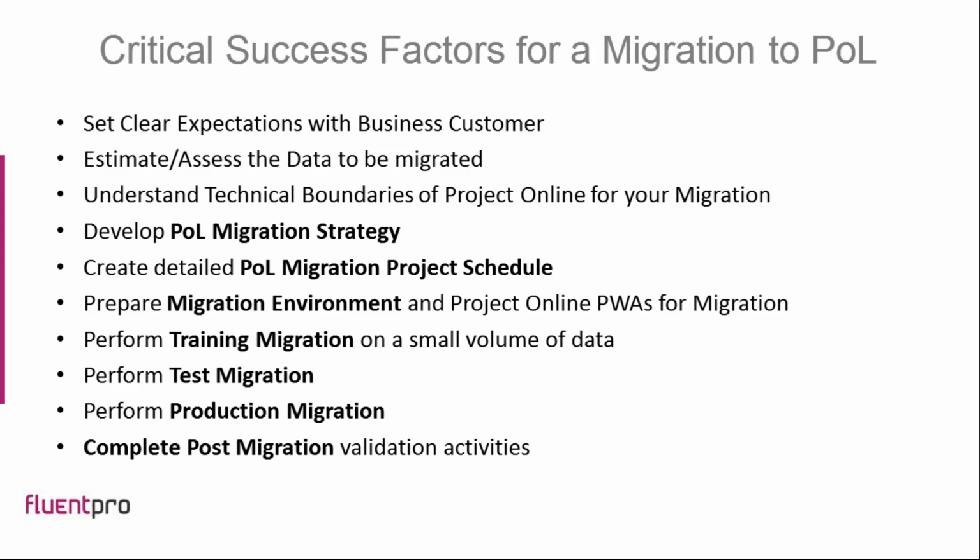Understanding the technical boundaries of Project Online for migration, and this has to do with the concept of how much data can be uploaded at once, how many accounts, how many VMs, the concept of throttling within a Project Online site and tenant. And again, you can plan through this, but you have to take it into account when developing your